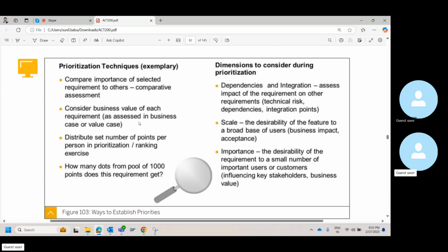This is directly shared with the customer. This case is a customization. The form should be developed specific to the customer, not as a standard. This change is very required because it has customer touch points, and pretty much all the sales that you're doing you'll be able to automate through this. So it falls under M.